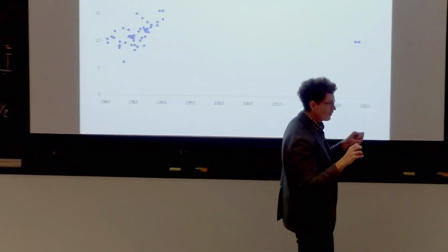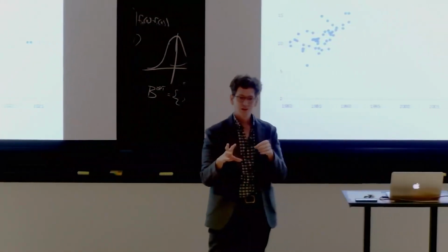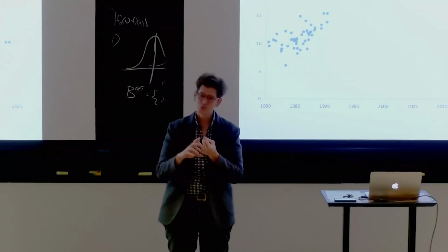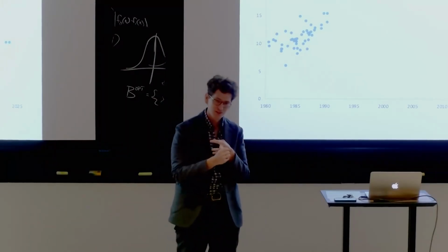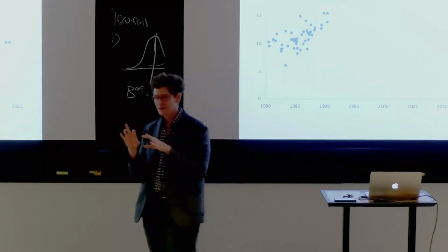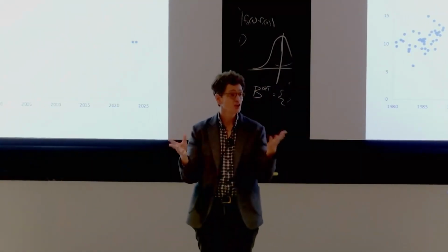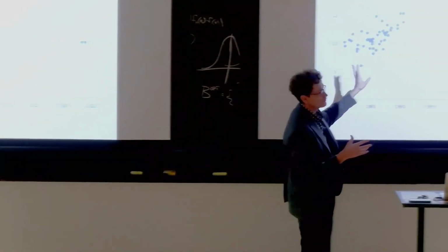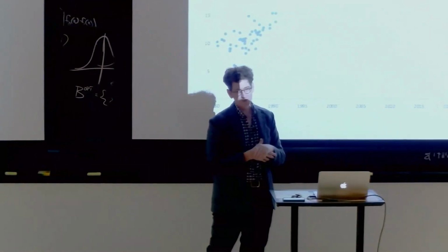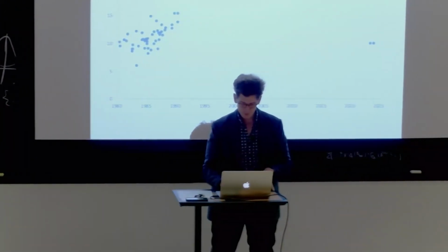But if you look at dollars, it turns out there are so many confounding factors about how they count, who pays what, what is included. Do they include the price of the land? Do they include the price of the engineering? A lot of that is opaque. When they issue numbers, they don't tell you what goes into that number. So I will give you both the dollar estimates and the duration estimates so that you can have some better apples-to-apples comparison.